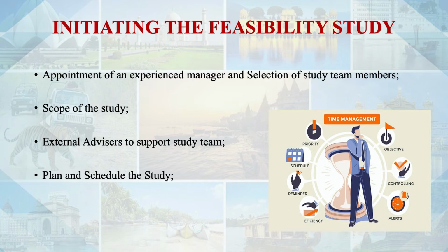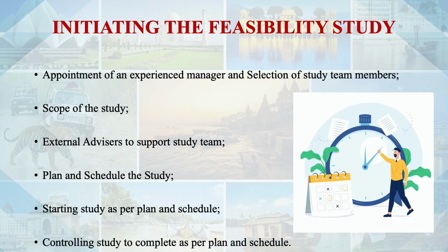We cannot spend a lot of time on the feasibility study, because if we have a total of 6 months to complete the project, and we spend maybe 1 month on the feasibility study, then it can be a big problem. We start the study as per plan and schedule, complete it, and control the study to complete as per the plan and schedule, so that later on, if the feasibility study finds it is feasible to initiate this project, we can go ahead with it, and then we need time to complete the project also.